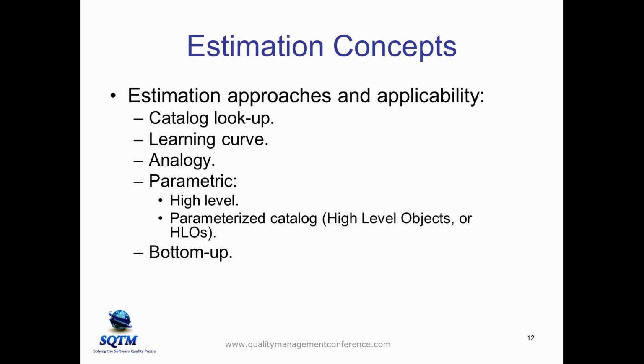Really through a historic, really more of a historic accident. It just happens that they're correlated. This kind of using that to do it, that type of parametric estimation is very high level. And it's kind of risky because if technologies change, if the underlying assumptions change, the parametric curves may not be applicable at all.